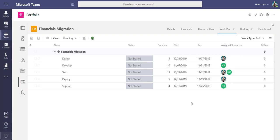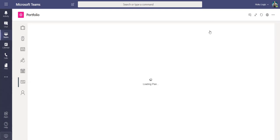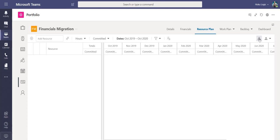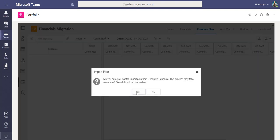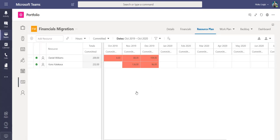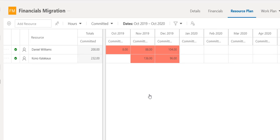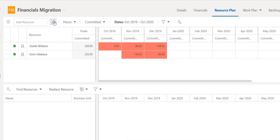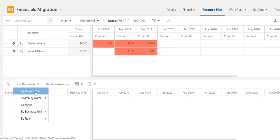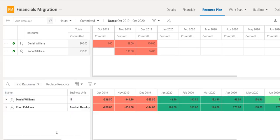Here I see my schedule of tasks. If I want to build out my resource plan for this project, I open the resource plan page and then click Import. Here I see how my resources are being committed and if they are being over allocated. If I want to see where else these resources are being used, I open the resource pane, and here I can see where else my resources are working.